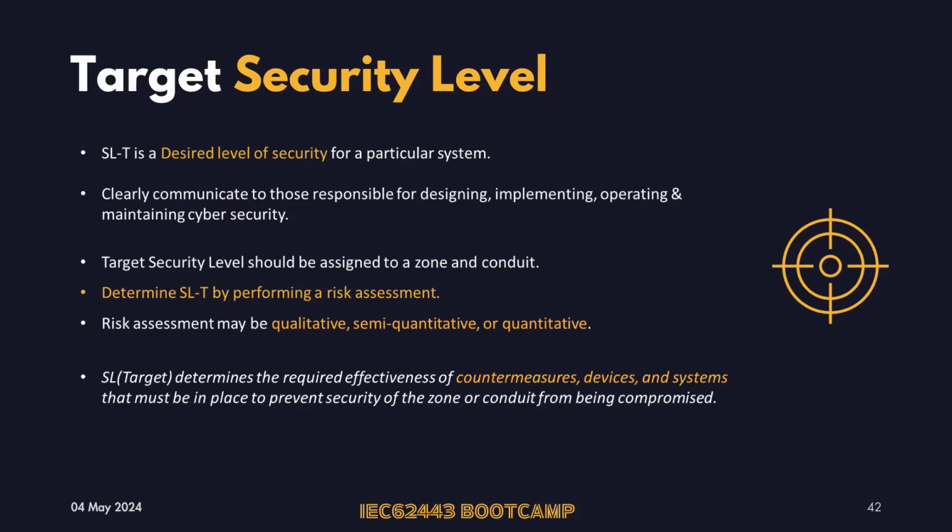It clearly communicates to those responsible for designing, implementing, operating, and maintaining cybersecurity. If you are an end user, for example, you can dictate the terms in cybersecurity during the bidding stage itself, that I need SL1 certified components or system, or I need an SL2 compliant system. Now, if you look at marine, the IMO has clearly defined the rules, like ER 27 and 26, which dictate that most of the control system components you use in the marine sector should be SL2 certified components.